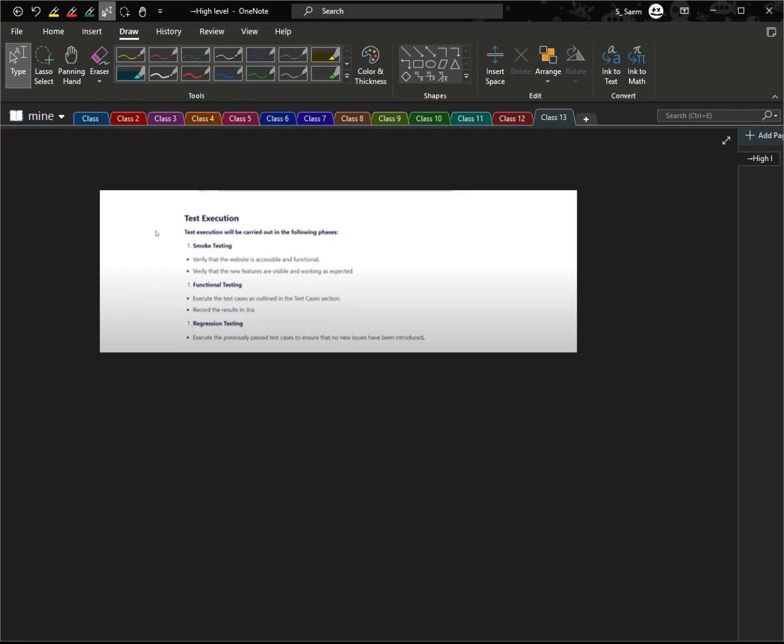You can also log defects: record defects with detailed descriptions, assign severity level, critical, major, or minor, and assign priorities, P1 for immediate attention and P3 for minor issues. Monitor defect status updates. Regularly communicate with the development team for status updates.